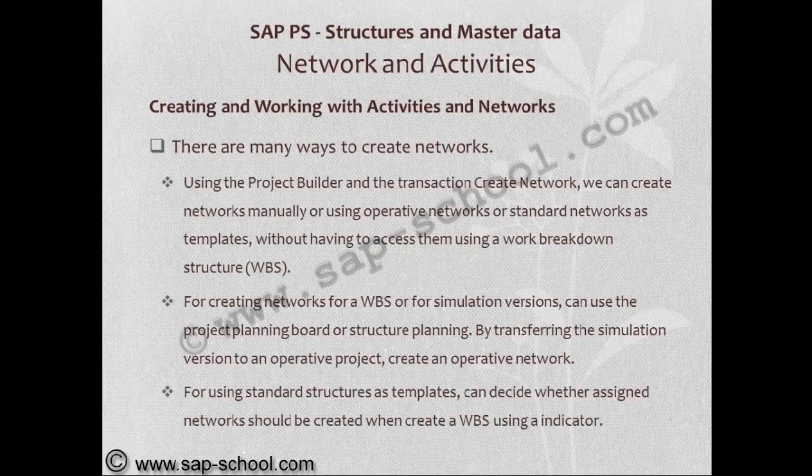There are many ways to create networks. Using the project builder and the transaction create networks. We can create networks manually or using operative networks or standard networks as templates without having to access them using a work breakdown structure.